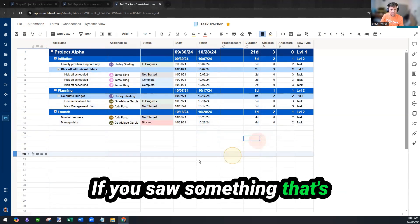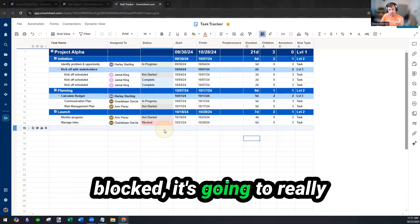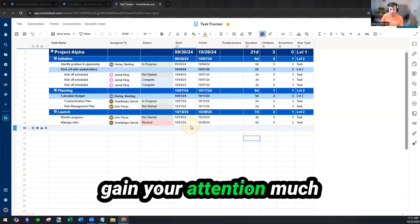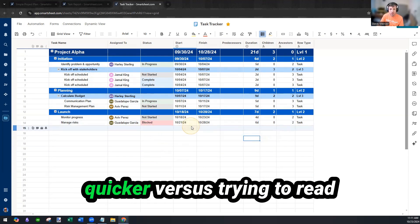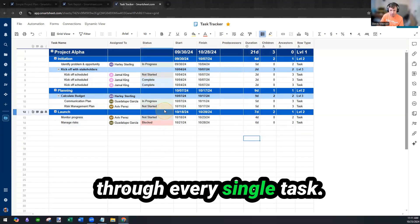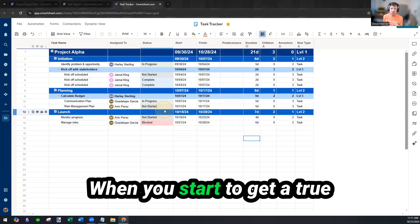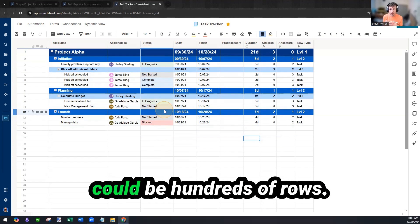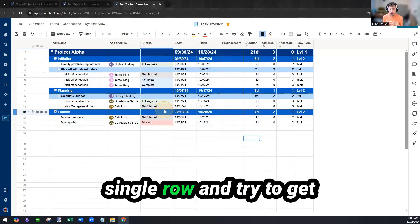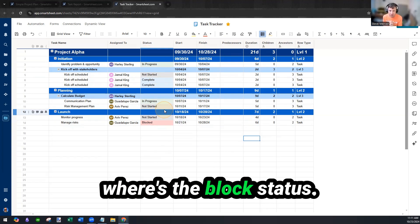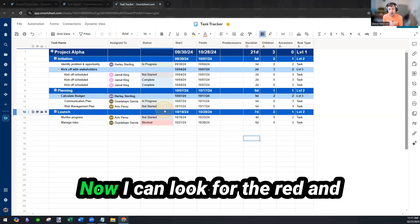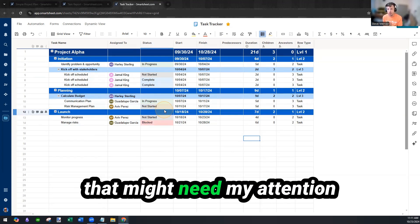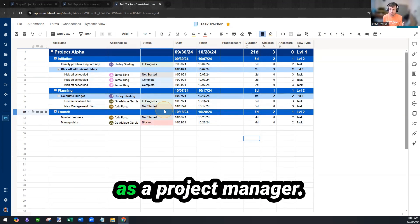If you saw something that's blocked, it's going to really pop out with the red and gain your attention much quicker versus trying to read through every single task. When you start to get a true project sheet together, this could be hundreds of rows. You don't want to go through and read every single row and try to get where's the blocked status? Now I can look for the red and say, hey, this is something that might need my attention as a project manager.